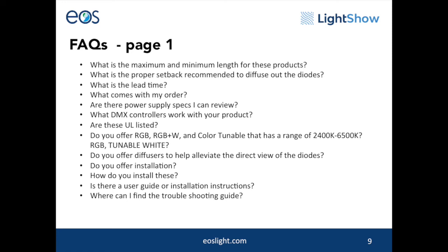Do you offer installation? Physical installation is not currently provided. However, we offer installation supervision services at a premium. Supervision involves the presence of a competent on-site technician during installation. It could also involve a competent individual to be intermittently available throughout the installation process with a final review of the work on the back end prior to commissioning and programming.